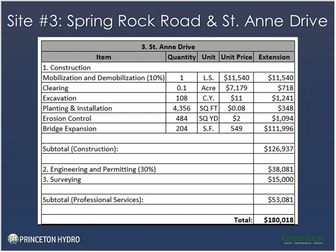And to give you an idea, like I said, we did these cost estimates. When we put the cost estimate together for this culvert replacement, it was approximately $180,000, which isn't a lot when you're talking about repeated homeowner damage to FEMA. So I think the cost benefit on this would be to the benefit of reducing flooding for these homes without having to have claims. We also want to make sure when you're doing a project like this, you're not increasing flows downstream and making the flooding worse. In this particular project, the downstream area was an open forest, so there was no increased flood risk downstream.